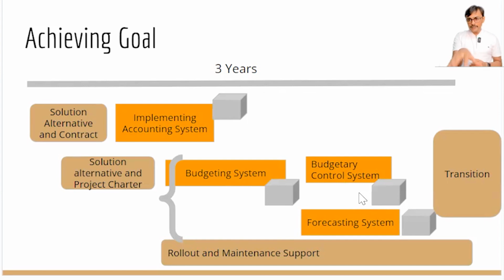That can happen. Here, I try to show that program benefits can be achieved incrementally. So as soon as the financial accounting system is done, maybe in the first year, we deliver it and we start taking benefits. Since the program is still active, we want to make sure the maintenance support is done well, and whatever integration is needed is also done in an appropriate manner with the other components of our program. So there is always a desire to produce incremental benefits. Each project component may produce output like a system, and they may also produce outcomes. During the program duration, we need to make sure those outcomes are maintained and sustained, and that they are aligned to the overall program objective.